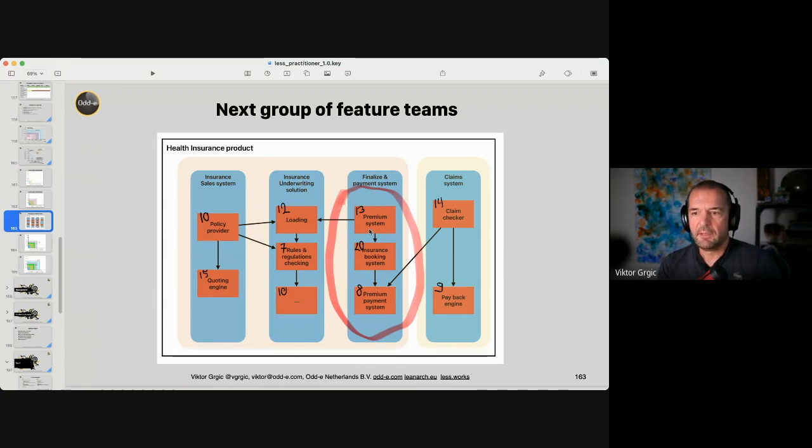And so that's why you can't really consider them full-fledged feature teams if these teams can deliver the features only within their system, simply because in the backlog priority is going to say at some point, your stuff, we don't need to do much in this group. We want your teams to work on other stuff, and then suddenly these teams are going to say, "But we cannot," and then you notice they are not really feature teams. Okay, that's something to keep in mind. And which brings me to the next picture.